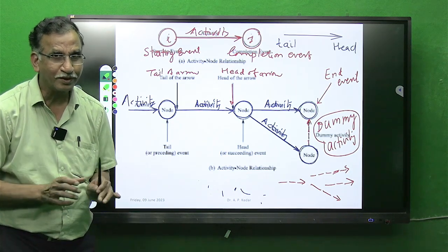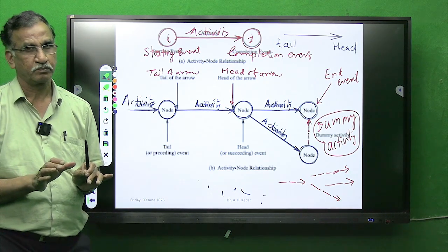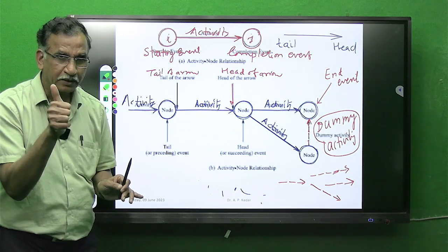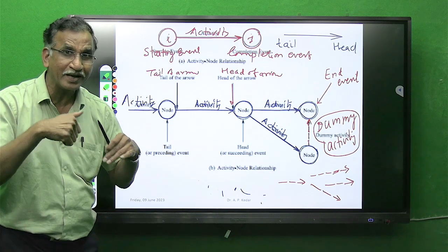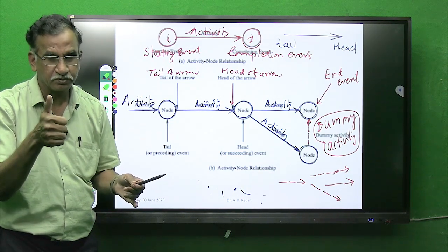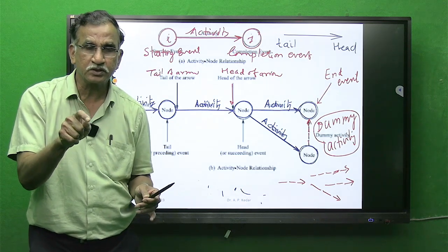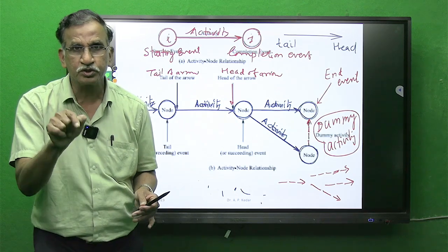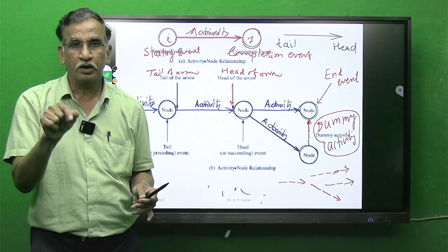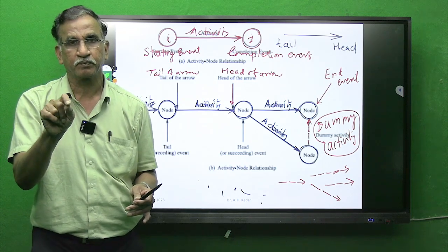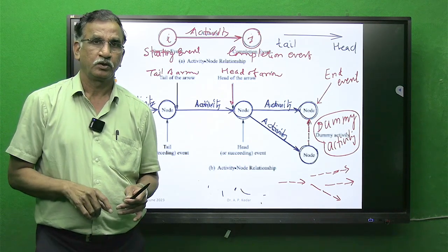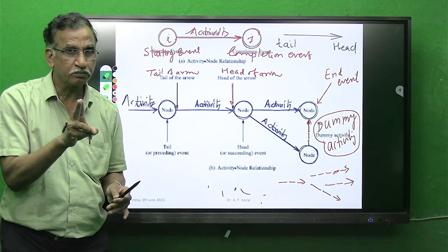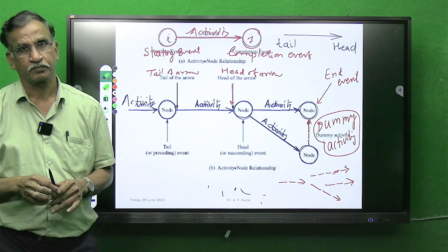only to show the relationship between interdependent activities. But that dummy activity, since it is fictitious, means it won't exist, will not consume any time and resource. We have studied in an earlier lecture that an activity consumes time as well as resource.